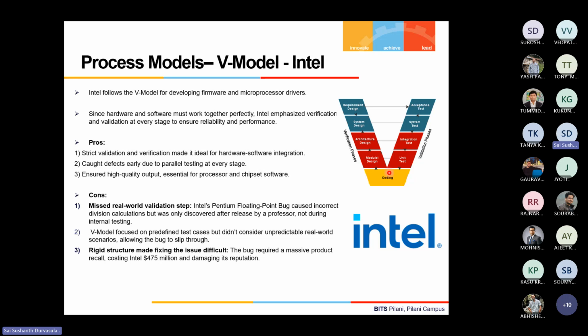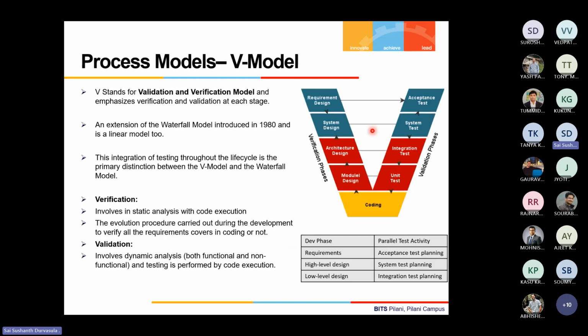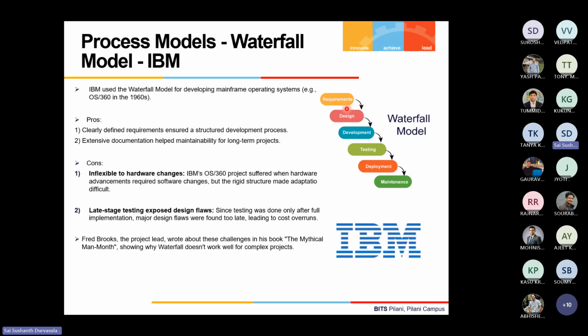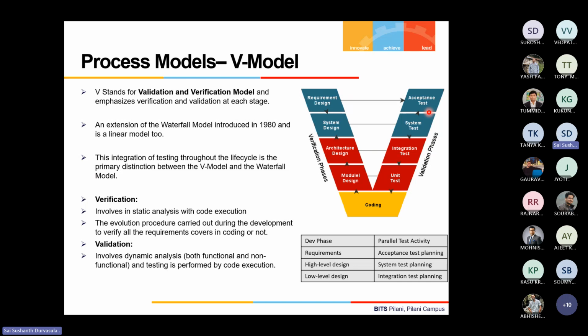Yeah, so that is with respect to the actual software, the technical source code that is being written. But for example, the requirements themselves, they can validate. Requirements is just a document, right? So they can easily have test cases and validate at this phase. Whereas that was missing in this case. There was no one sitting and verifying whether the requirements were meeting, or validation of these requirements was not there, right? So that's something that is added here.